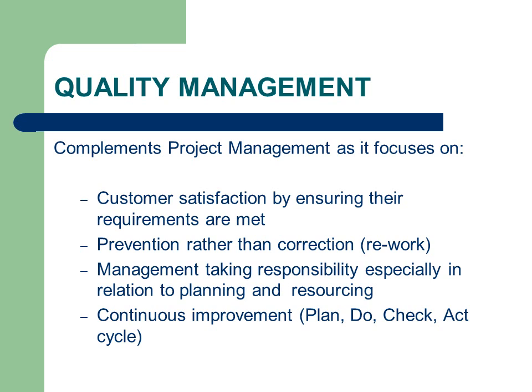Quality management supports project management by ensuring that the project work is done well. Good quality will result in customer satisfaction by ensuring that their requirements are met. It supports prevention of errors rather than correction. Error correction is rework, that is, doing work again. Rework costs a lot more than prevention.